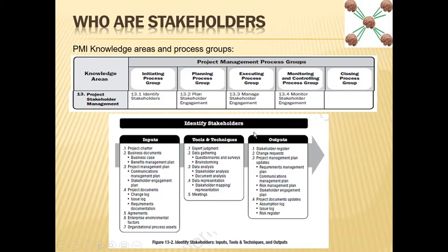Now, because of corona, you again need to identify more stakeholders. For example, if it was a telecom project and you just had to go and install a site, suddenly you come to know that you cannot leave just like that. You have to take permission from the deputy commissioner of the area to do a movement, whether the area is sealed or under lockdown, whether transport is running or not.